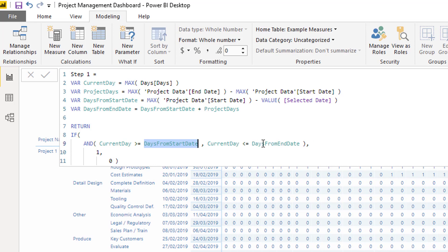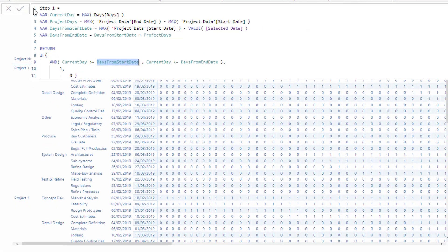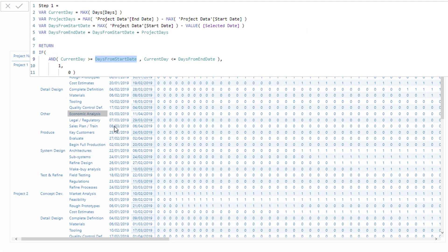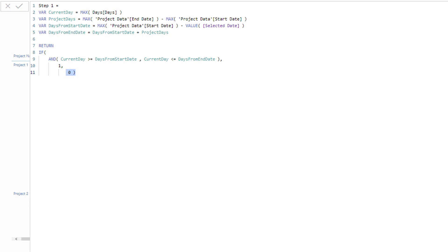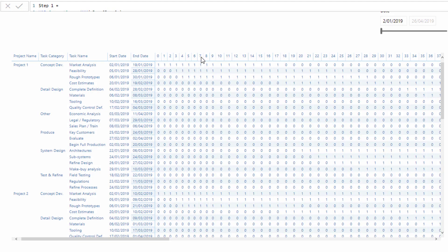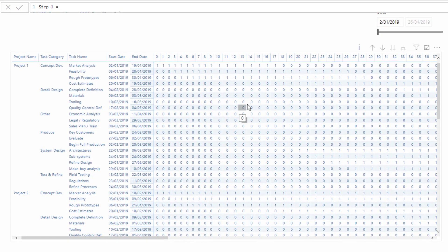So basically, if that numbered day up in the top row creating the columns in the matrix, if that day is greater than the start and less than the end date for every single row here, then equal to one, if not equal to zero. That's how I'm turning dates into numbers and getting them inside my matrix.